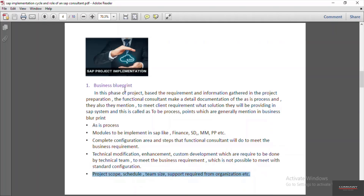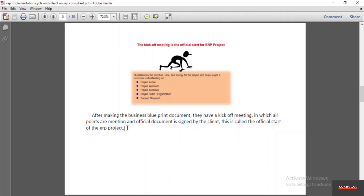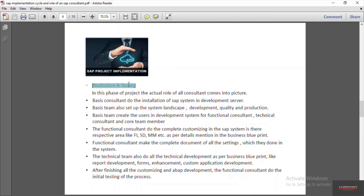After preparation of the business blueprint, they have a meeting with the client generally called the kickoff meeting. In the kickoff meeting, they share the complete business blueprint document and get the official sign-off from the client. This is called the official start of the project. Once the kickoff meeting is done and both the implementation partner and client agree on the terms and conditions in the business blueprint, the next phase — realization and testing — begins.